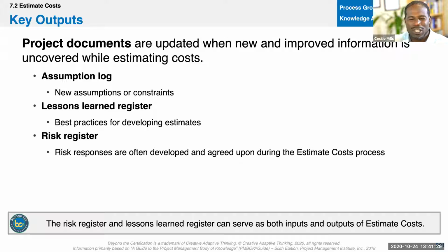We look at it, we use it on an ongoing basis. So just want to mention that here. All right. Assumption logs, are logs living and breathing also? No, because with logs, you just log something in there. That's it. A register can change over time. Here's what I mean. In your stakeholder register, people can go from positive to negative and from negative to positive, from powerful to no power, right? And you would consult it on a regular basis.